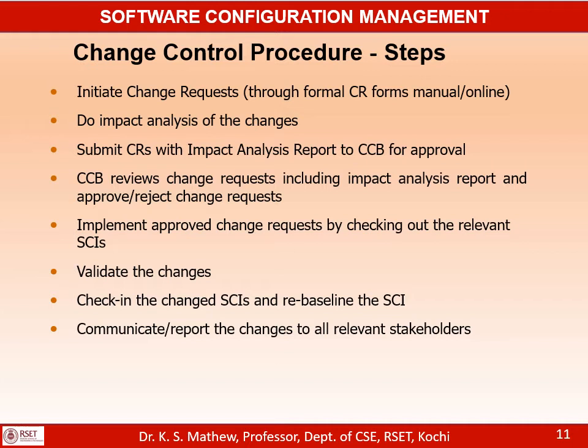So they will check out those work products and do the modifications, and once the modifications are over, it will go through the normal verification and validation process. Once the changed work products are verified and validated, they will be checked in again. The changed SCIs will be checked in again and rebaselined by the CMIC. So that's the last process.